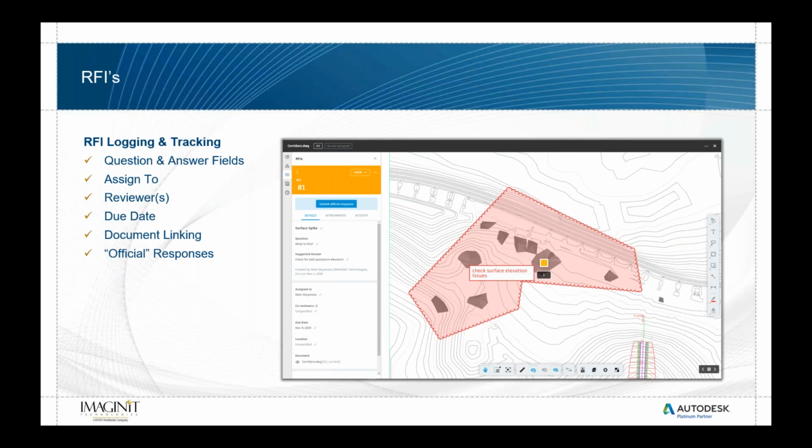So RFI is kind of the higher level of formality there. And RFIs by default are not activated inside of BIM 360 Docs. It's a feature that you need to turn on when you set up the project as well.